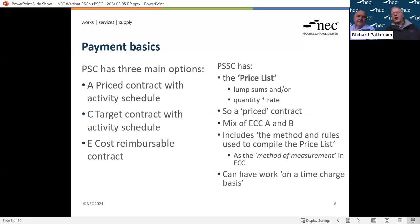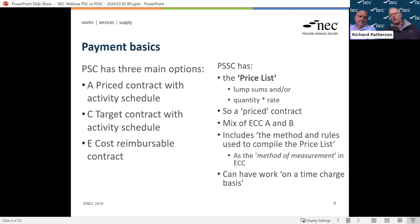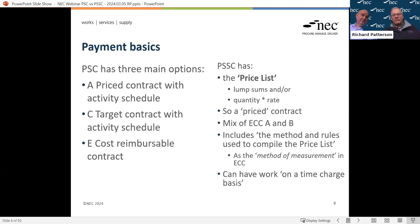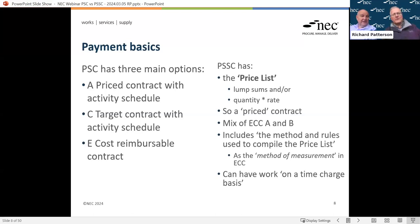It's very definitely a priced contract - we don't have any target contract options. The price list requires you to include what it calls the method and rules used to compile the price list - that's the equivalent of what we'd call a method of measurement in our industry. We can also have work paid for on a time charge basis, where the bidder has given us rates for different grades of people. Those rates will be in the price list and we just pay them by the hour or by the day - so it's effectively cost-reimbursable.